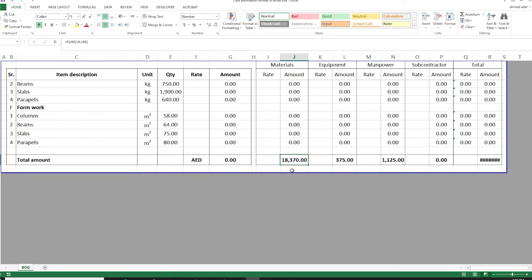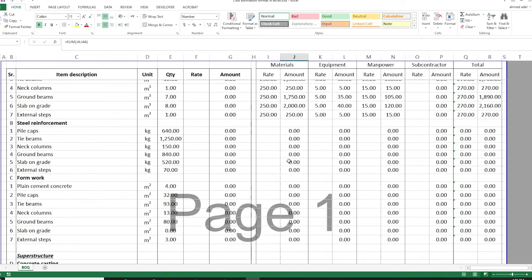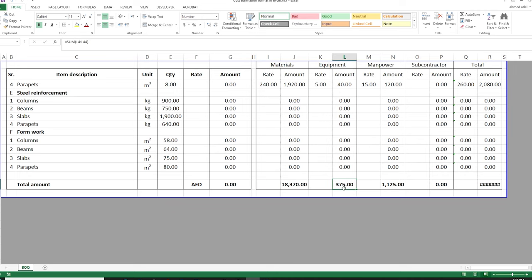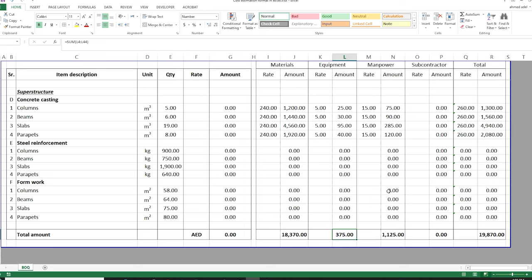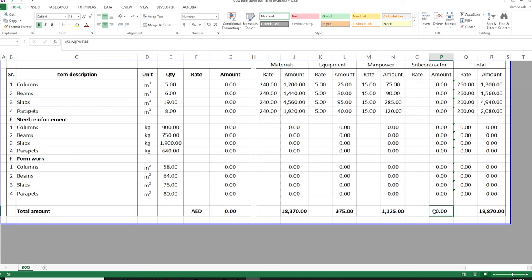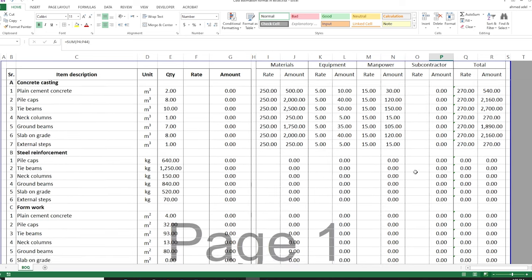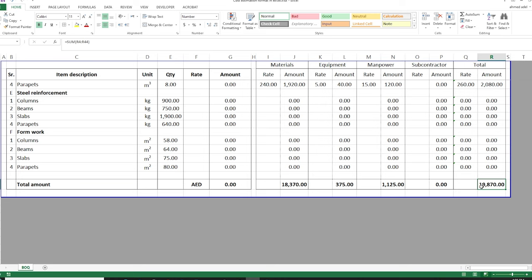I'm starting to get some amounts here. I need 18,000 for the supply of concrete, and 375 for the equipment — vibrator or whatever. This is a small project so the quantities are small. I need 1,100 as the cost of manpower to cast the concrete, and zero for subcontractor since I didn't price any. The total so far is 19,000, which is the sum of materials plus equipment plus manpower.